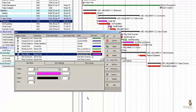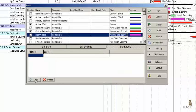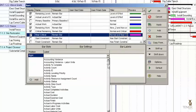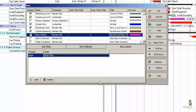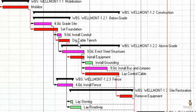We can do one more thing — we can add a label. We can add a total float label. When I hit Apply, you may barely see that it's displaying a float of four days for Grade Site and nine days for Install Conduit. Not only do you see the magenta near critical activities, but you also see the total float value.